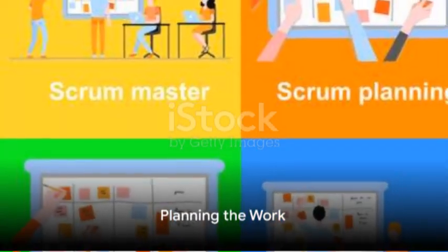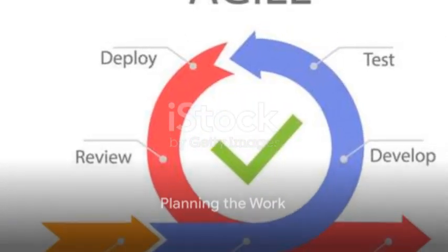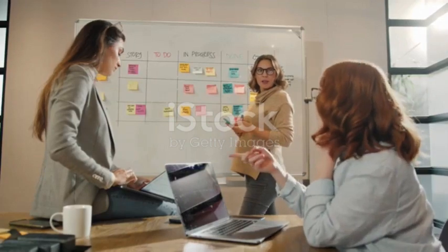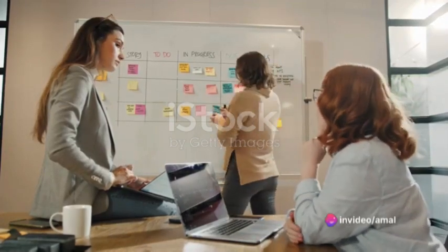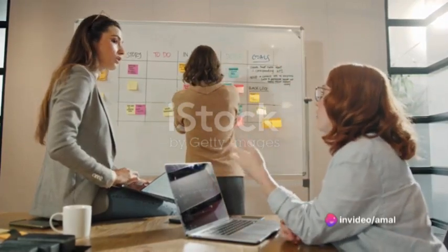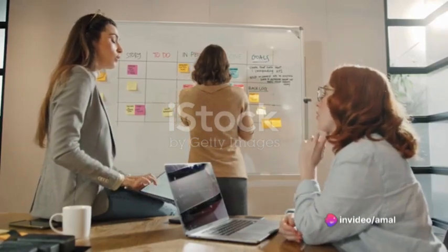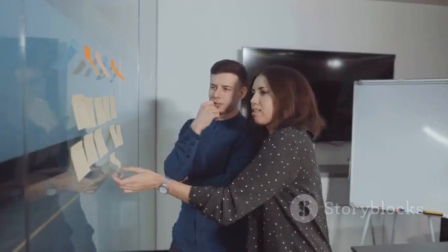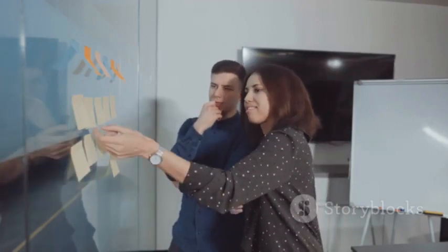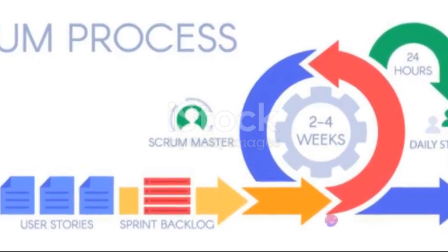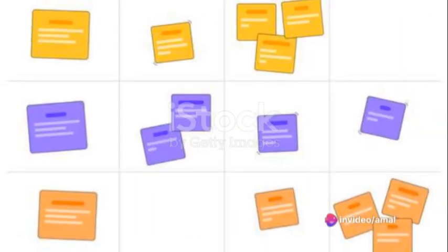The final key aspect of sprint planning is planning the work. For each selected product backlog item, the developers plan the necessary work to create an increment that meets the definition of done. To make this task manageable, developers may break down items into smaller work units, often one day or less. The sprint goal, selected backlog items, and the plan for delivering them combine to form the sprint backlog.